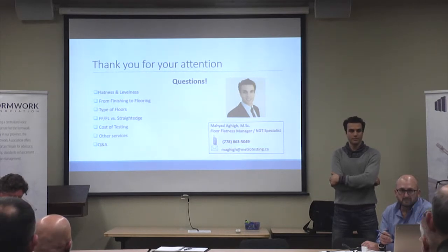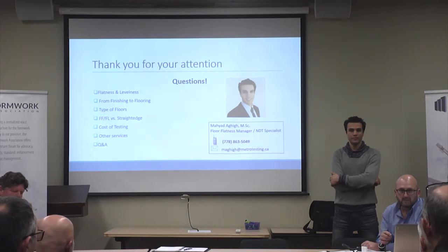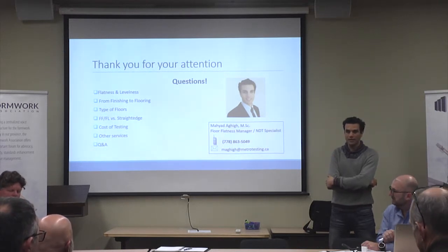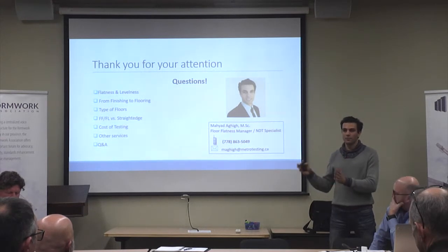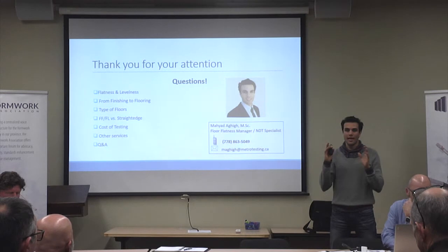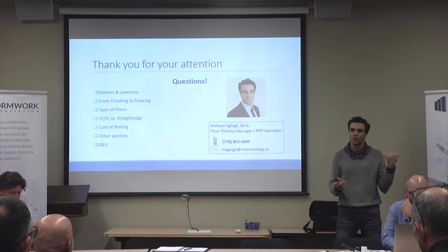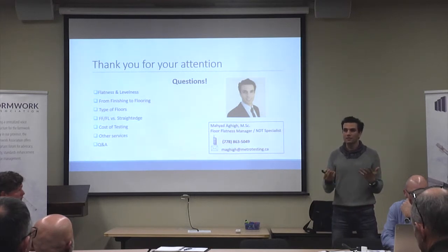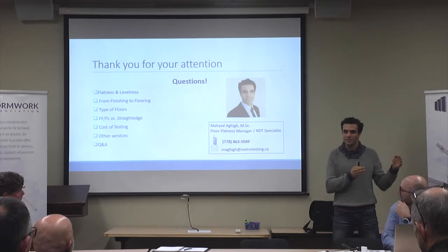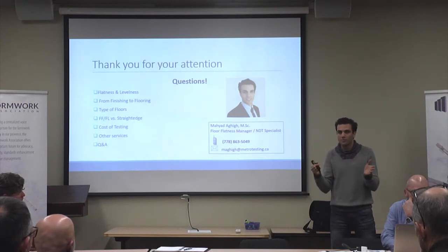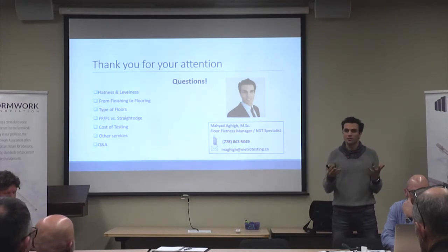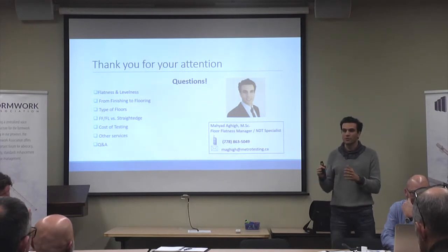Not for the floor guy to fix it, it's the GC who will have to carry that money and spend it. And I have actually seen this scenario several times: everything has been on the contract, the forming company has done his part and is off the hook, and then it comes to the general contractor, not to pay from his own bucket, but he's going to go to the owner and ask for more money. That's usually what eventually has to happen, because the owner should understand that this is happening, so they need to provide more money, or the GCs should start to realize that this is a cost that they need to account for. They already know.